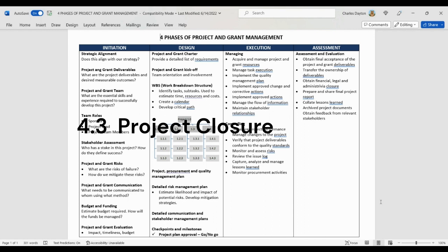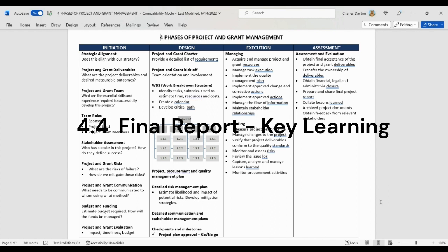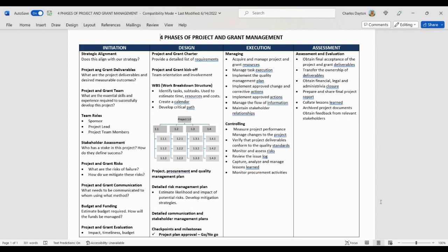Create some kind of report. Sometimes it's referred to as an after action report. What do we learn by doing this? How do we streamline this, improve it in the future? What were the lessons learned, and so forth? And then making sure that the documentation is developed and recorded, so ultimately the learnings and the success ideally is recognized in the planning process.